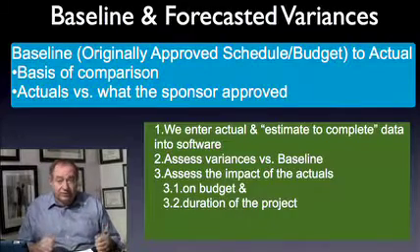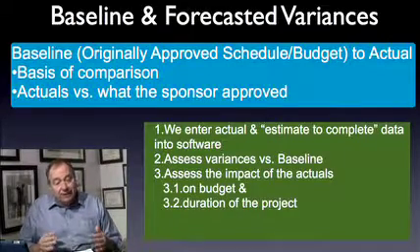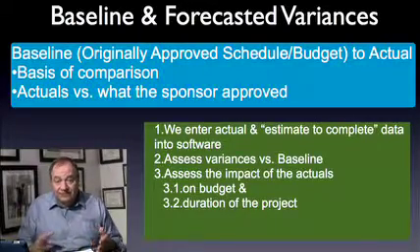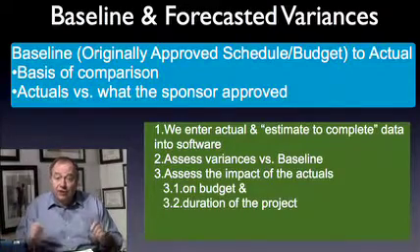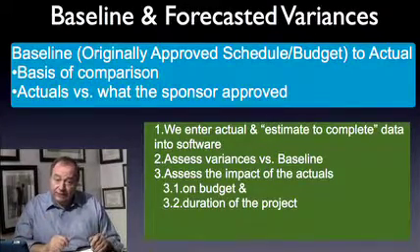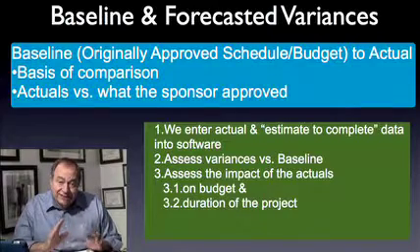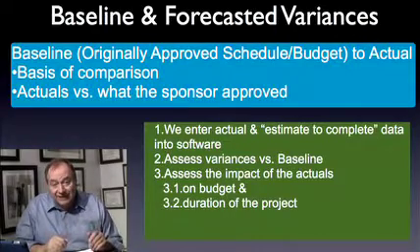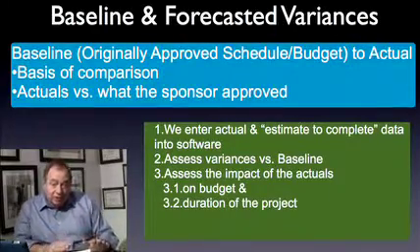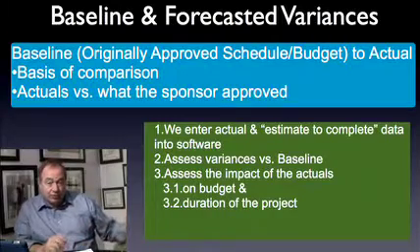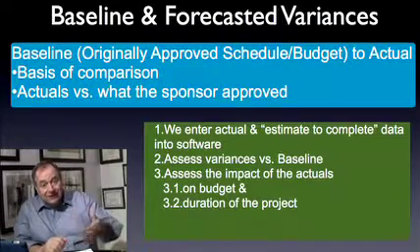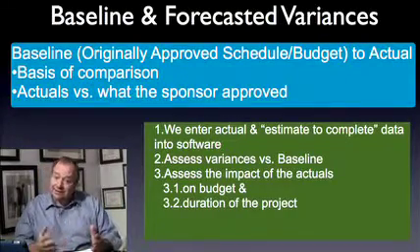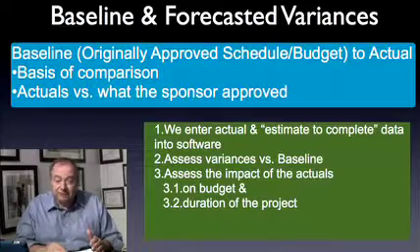You have to look at your critical path and identify if task 37 has slack. If it has enough slack to cover the week and a half overrun, we don't have to solve that problem, do we? So we don't need to solve every variance, which project managers who don't have these tools think they do. Now we're going to note that task and we're going to watch it, but if we have sufficient slack to absorb the overrun, then we tell the sponsor that and let the slack solve the problem for us.